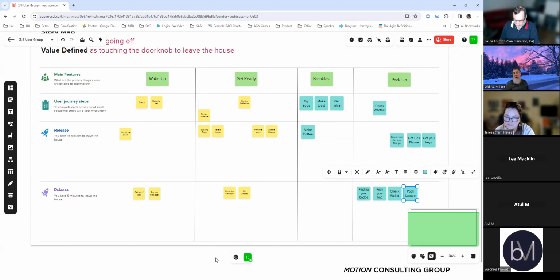So this is not a sprint planning exercise. Any large product you want to kick off, I would start with something like this. If someone comes to you with a brand new feature that you've never thought about, I might decompose the individual feature using this. So it's not a cadenced event. It is more about how frequently you get these new ideas coming in.